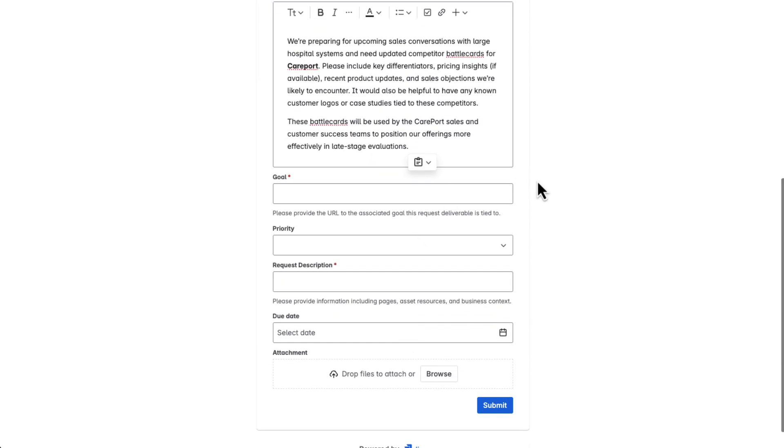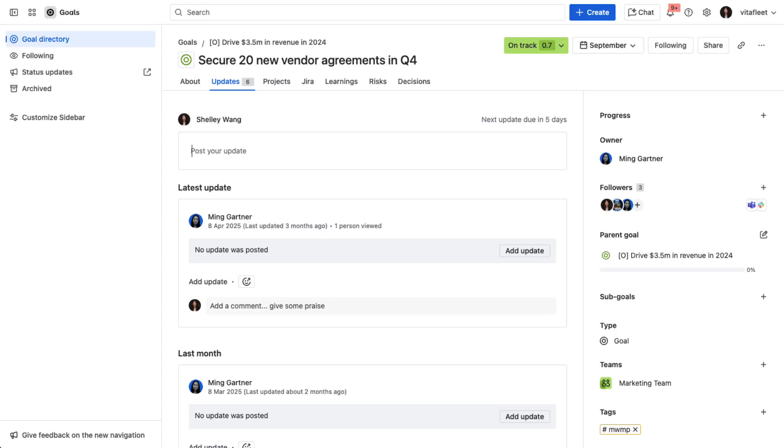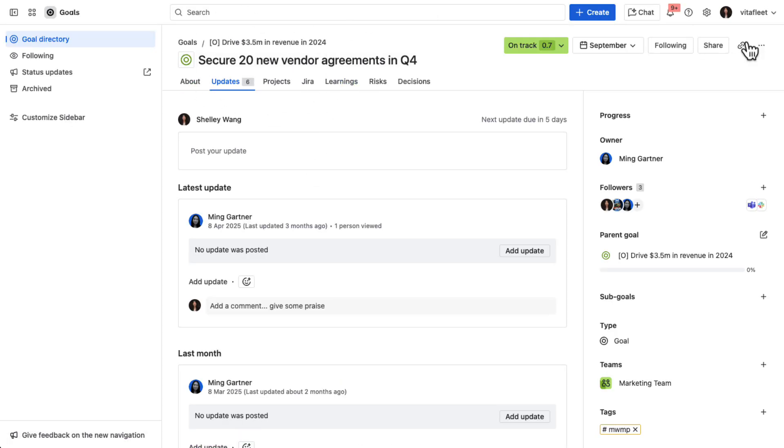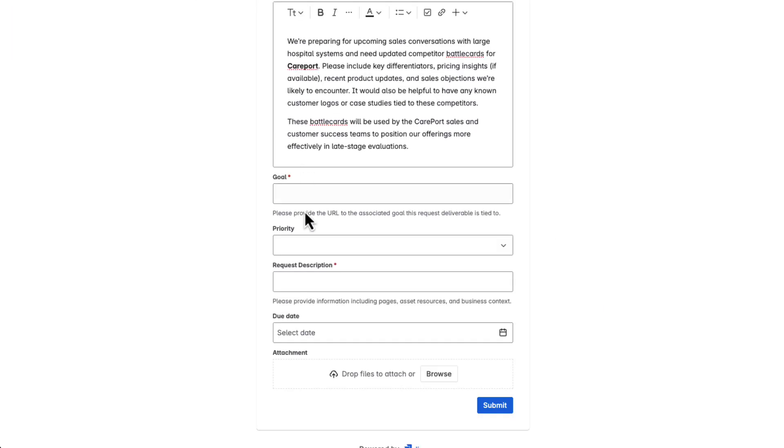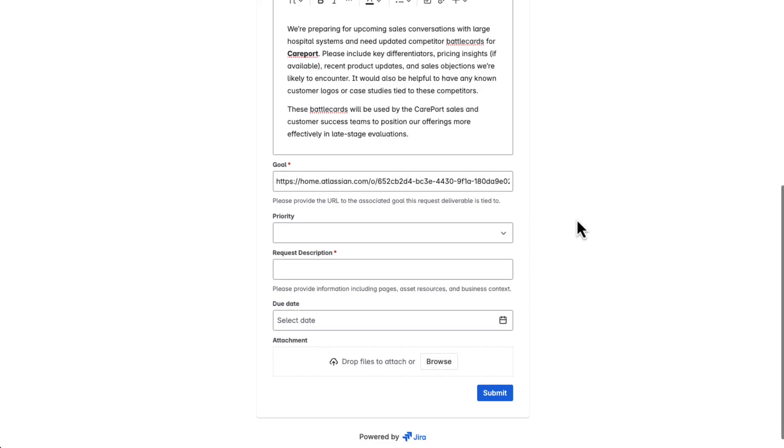She also links the request to a key sales goal, securing 20 vendor contracts in Q4. That field is required. Marketing has it to ensure every request ties back to a broader business objective. If it doesn't, they might deprioritize or even decline it.